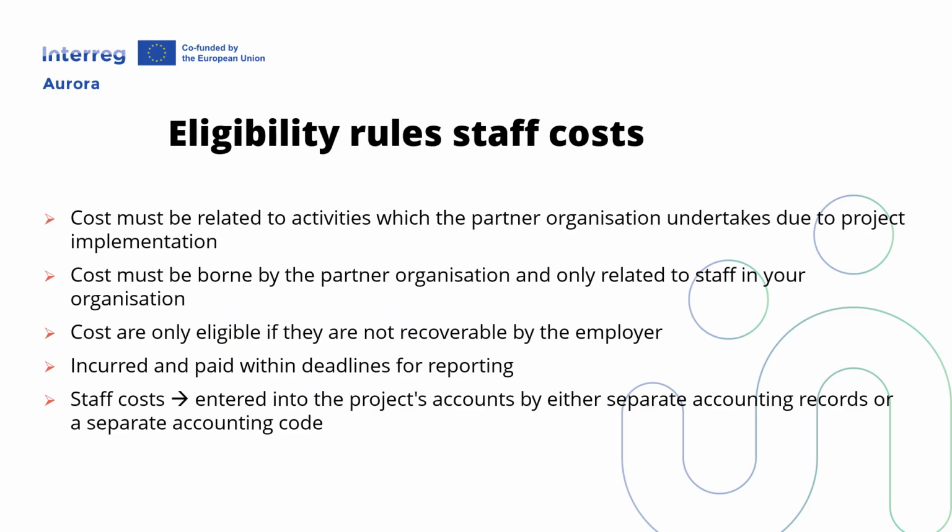Staff costs must be related to the activities in the project and to the responsibilities of each staff member. So, you need to have a clear connection between the reported staff costs and the activities in each period. And the descriptions in your progress report are very important.